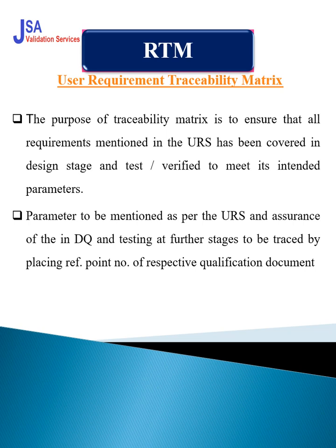So where you identified that part, where you challenged this part, suppose 6.1 in operation qualification under the security, this is section number 6.1, security verification or verification of password. So you have to mention the section number against the stage, like OQ 6.1 we have done this test. Okay, 12.3 section we have done this test.